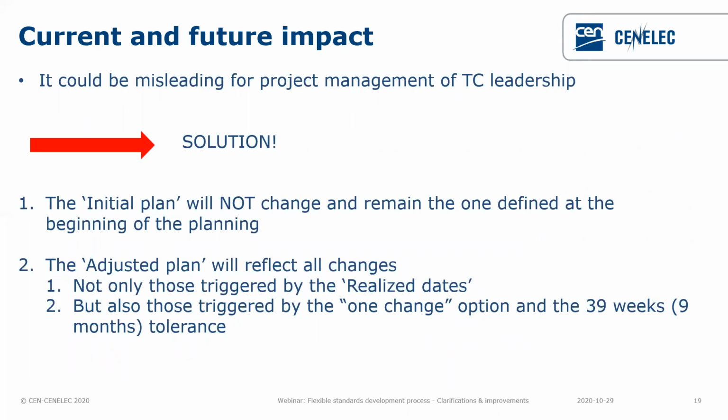So indeed, in that context, it's the opportunity to share with you the solution we are working on to avoid this kind of misleading information in projects. Also taking into account that now projects is not only open to secretaries, but also to more public actually. So this is something crucial we are working on, and the solution for increasing the clarity will be the following: the initial plan will never change anymore through the process once it has been agreed at the start. So the initial plan will always reflect what was decided at the very beginning,